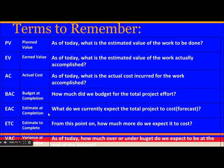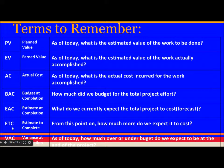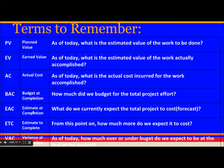EAC (Estimate at Completion) — what do we currently expect the total project to cost? This is a forecast. ETC (Estimate to Complete) — from this point on, how much more do we expect it to cost? This is also a forecast. VAC (Variance at Completion) — as of today, how much over or under budget do we expect to be at the time of completion?